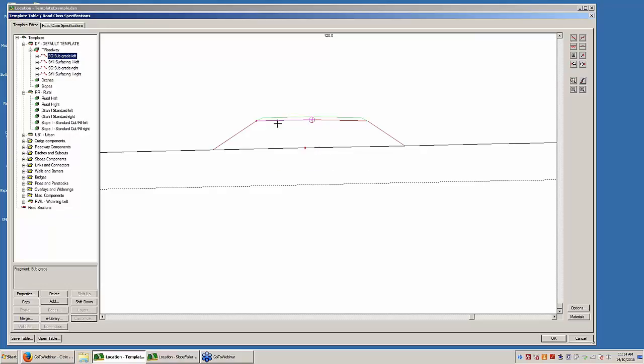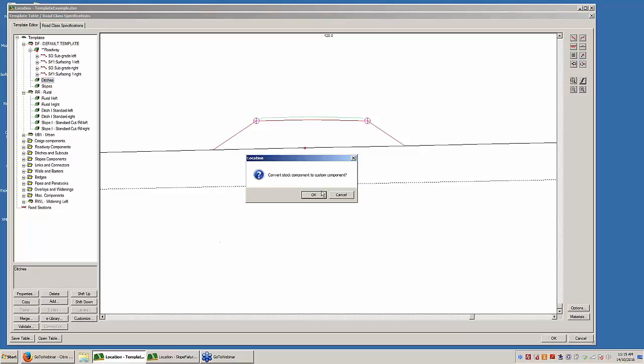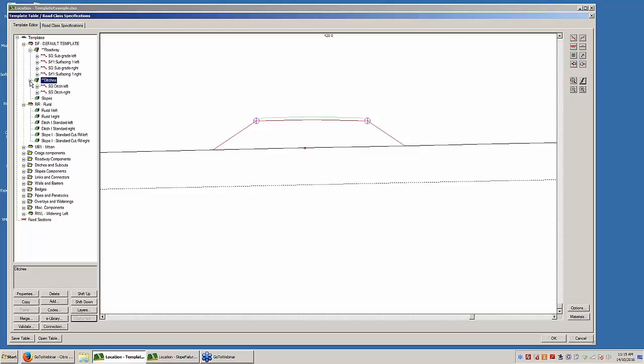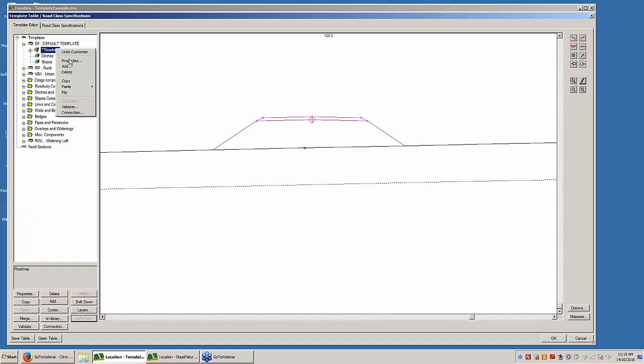So it's what you'd think. You are constructing the road. The first thing you're going to do is you're going to put the subgrade in. Similarly, the ditches component is broken up into surfaces, and I think this one will just have one surface in it. Yeah, subgrade surface. So there is a sequence in which these things are done, and it usually starts with the subgrade, and then surfacing materials are applied after that. So let me just undo this stuff. Not that I've changed anything. Yeah, so there's a very important sequence to things.